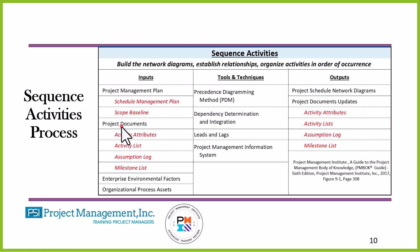Here is the structure of the Sequence Activities process from the sixth edition of the PMBOK Guide. The schedule management plan is an input — it tells me how to do this process. I also have the scope baseline, which is made up of the WBS dictionary and the scope statement. I'm going to decompose those work packages down into individual activities, and from that I will sequence those activities. When I decompose down to activities, I'm creating the activity list.